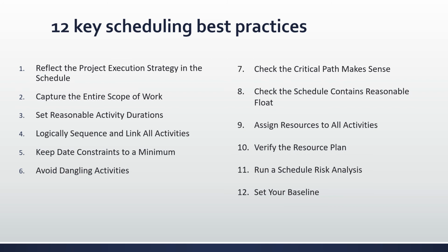However, as the activity duration is a single deterministic value and not a range of possible outcomes, the end date is also forecasted as a single value. So in real life, the duration of an activity may vary, but the single value should be considered your best estimate. So to understand how uncertainty and risk affect your project and your project schedule, run a schedule risk analysis.